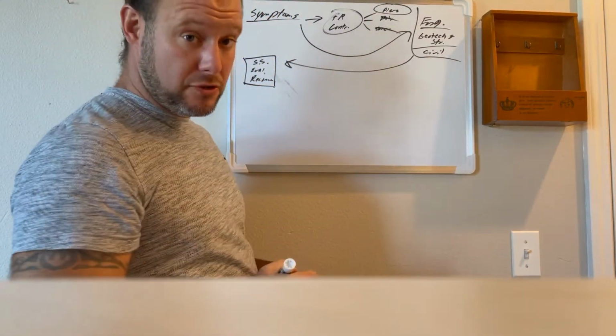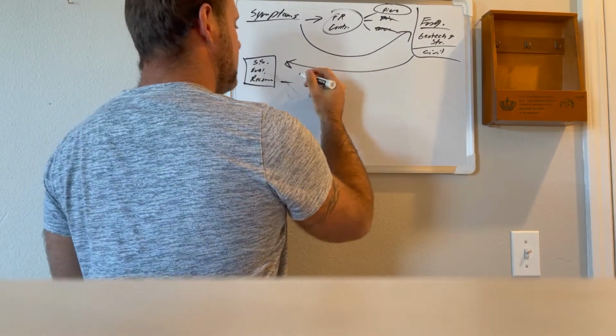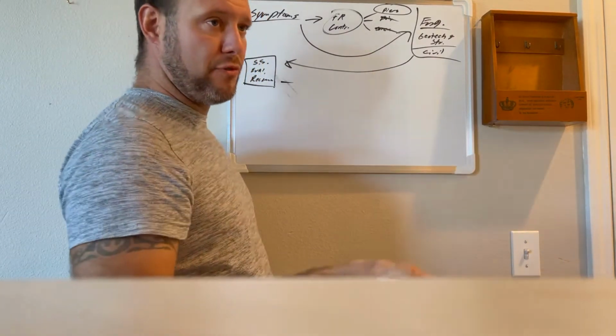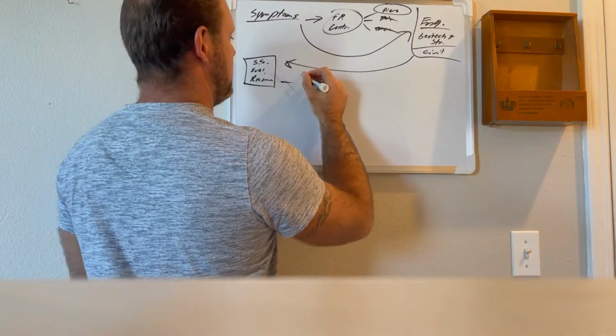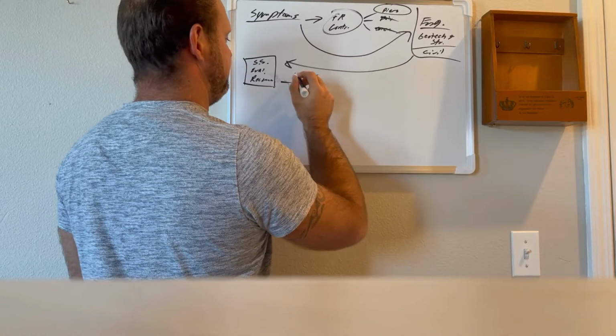You're going to go back to the contractors portion, and you're going to say, hey, talk to an engineer. This is his recommendation. I need X number of piers based off of whatever. They're going to come out and do their evaluation, and they're going to give you proposals. So, contractors, proposals.